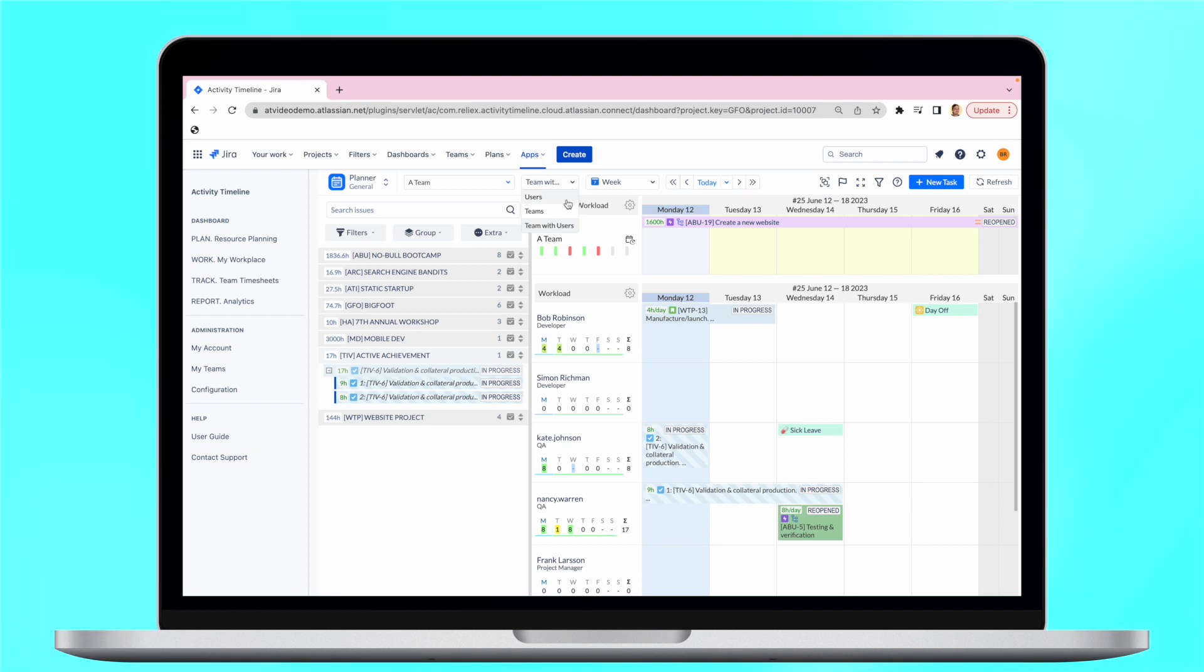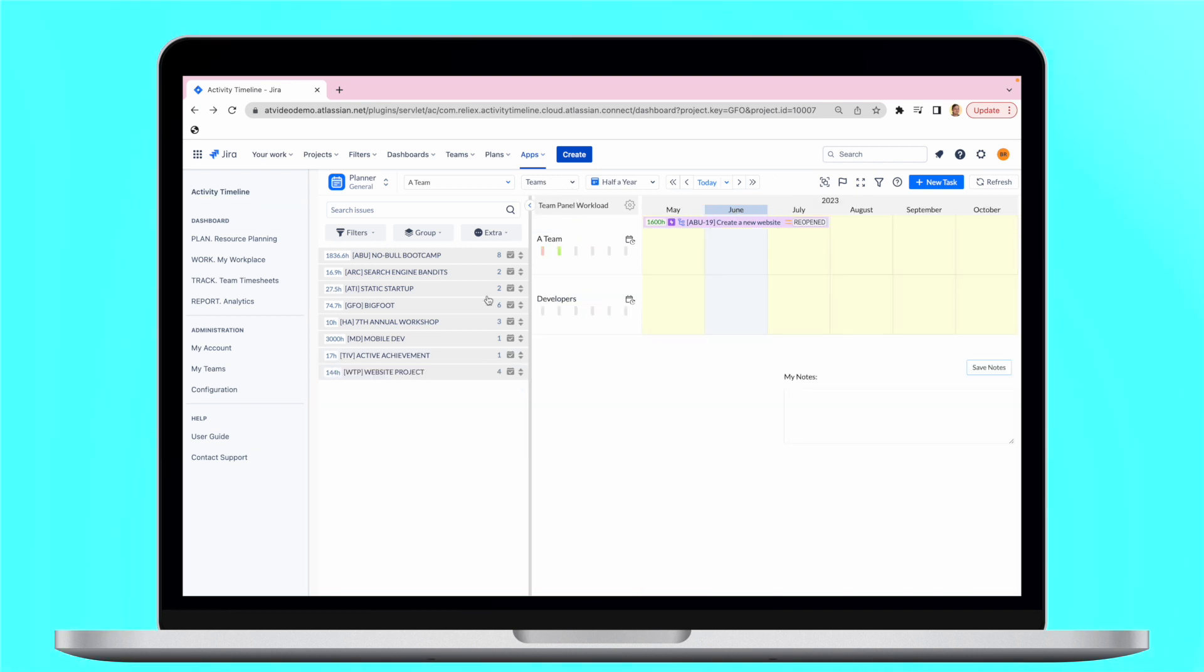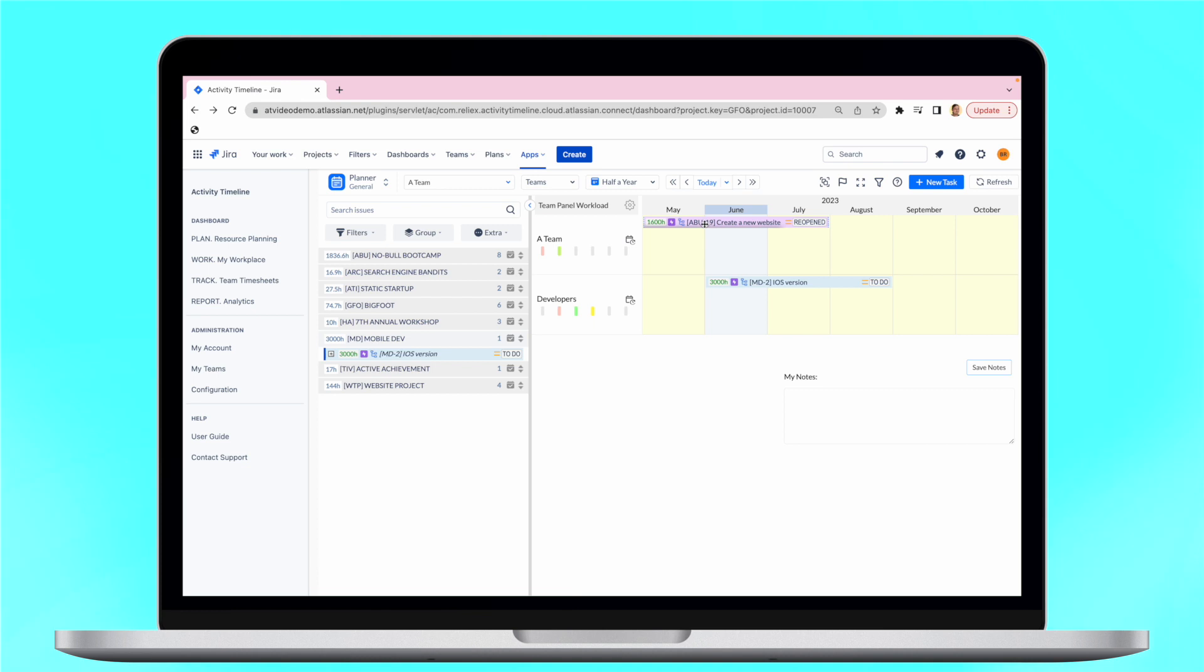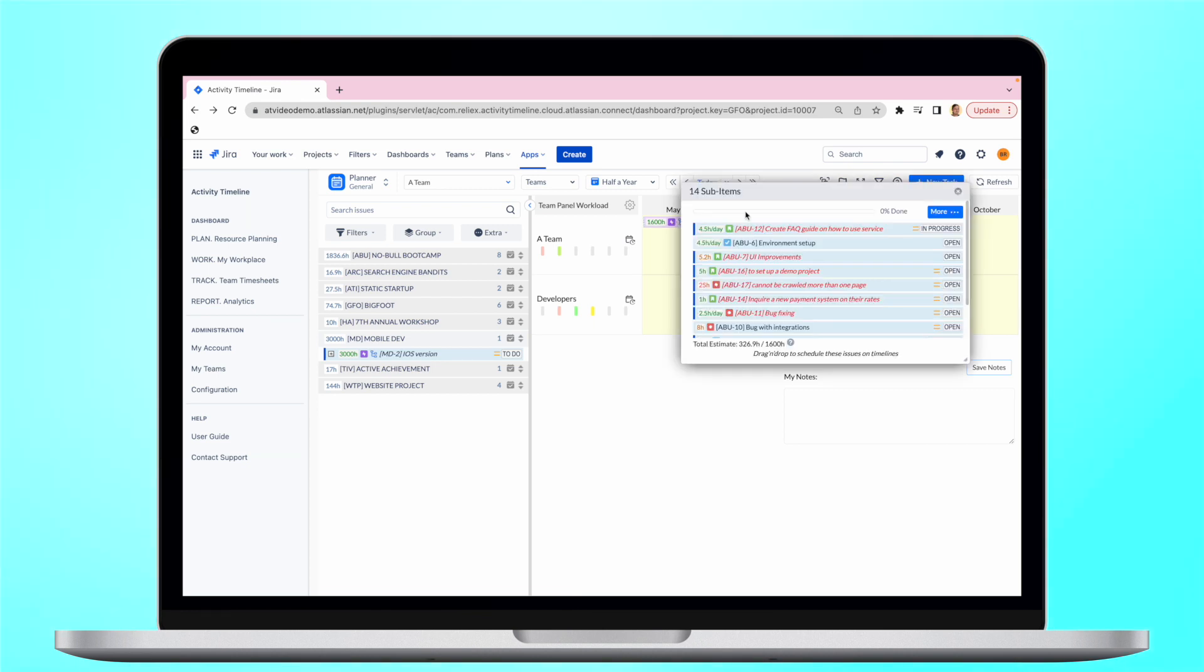Team timelines help to manage workflows across multiple teams simultaneously for the long-term scope. It enables you to schedule large tasks such as epics for the entire team without the need to allocate it to individual resources.